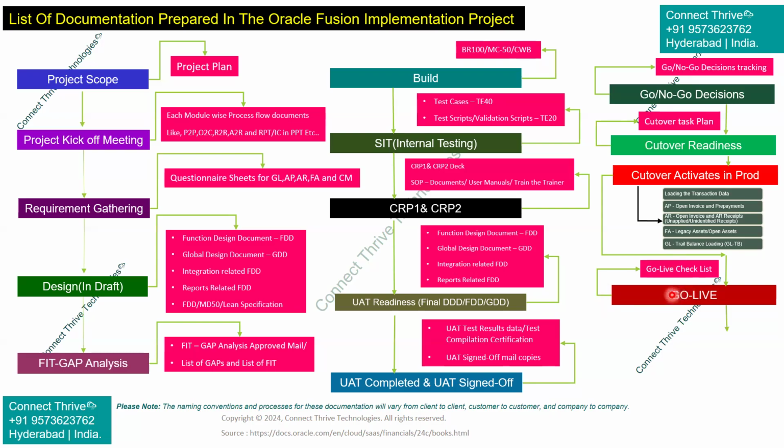Okay. So once we announce the go live, the users will try to book transactions in the production environment. The go live period will be maximum 30 days if it is a fresh implementation. If it is a rollout or some piece of change, it could be maybe 1 week to 14 days. It could be different from customer to customer.